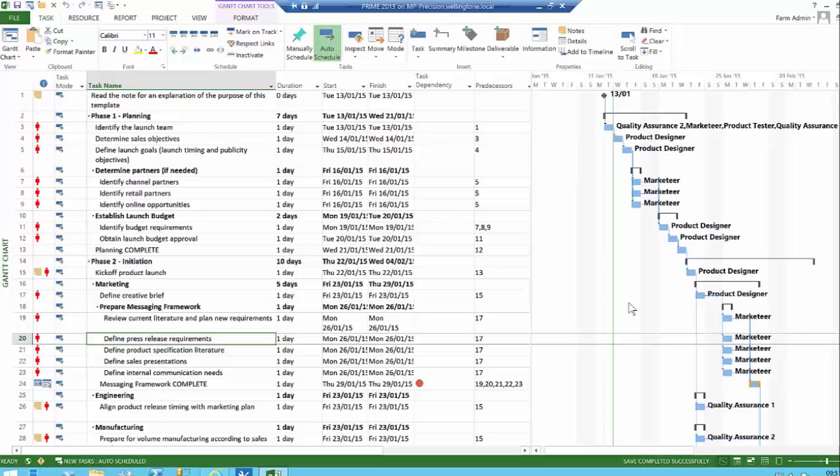So I hope that you enjoyed this video on how deliverables and dependencies work. They're very, very powerful. They work very, very well, because with a hard link between projects, when the date changes in another project, the schedule changes automatically. But with the deliverables and dependencies, you've got control of your schedule, and you can choose whether to sync or not.